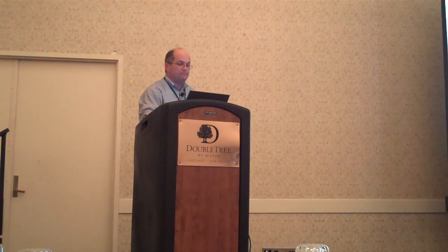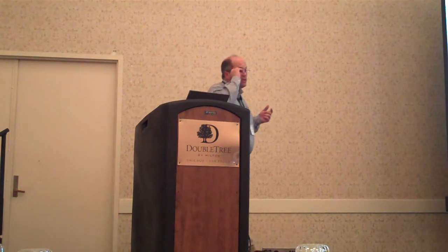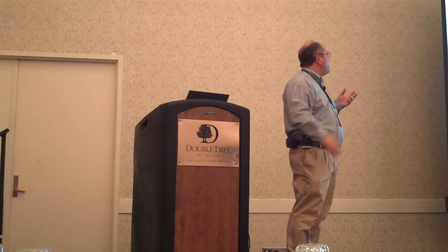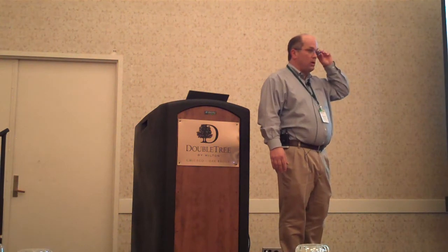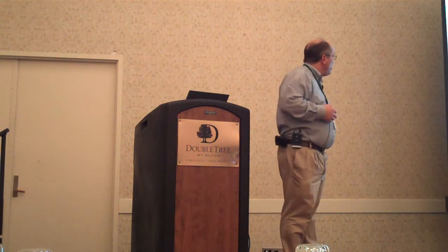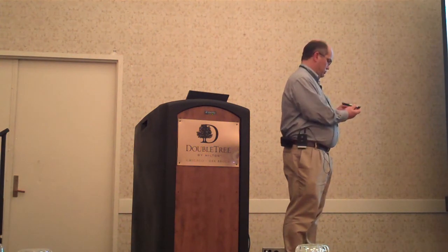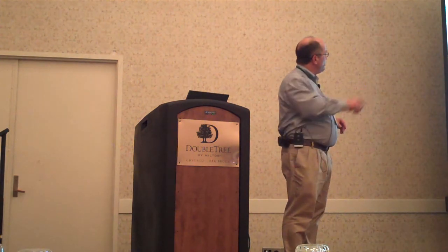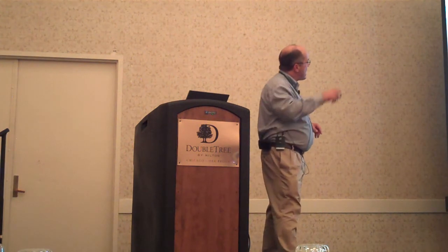I probably should set the baseline now. So now it's time to kick it off, and the team is going to come in here and start to execute. The team is focusing on this screen. Every night there's a job that runs. It takes a snapshot of the project for that sprint, looks for any updates, and records the amount of time that's remaining for those little blue data points that you see here. It tracks the time and the dates through the whole thing.